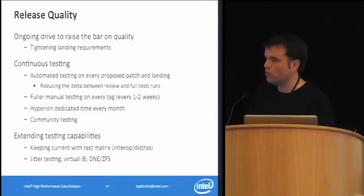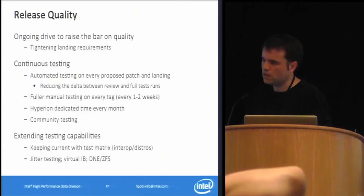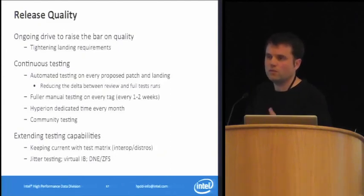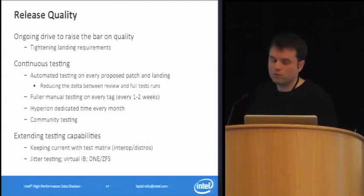And also, Livermore have shared with us a workload simulation system called SWL, synthetic workload. Basically it runs random amounts of random loading tools in varying amounts, and so it simulates a production environment more than just running one particular benchmarking tool for a long period. We actually have more variability. We got that quite late in 2.3, and that's in fact why 2.3 was a few weeks later than expected. We got that for the first time, ran it, and discovered a couple of very serious but subtle bugs that we wouldn't have known about otherwise until things were released in production, and we were able to take the time to fix them. So that's been very useful going forward.